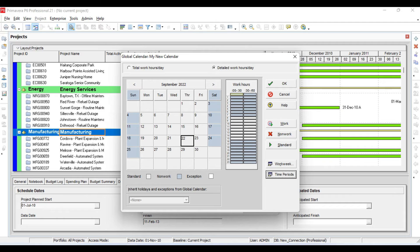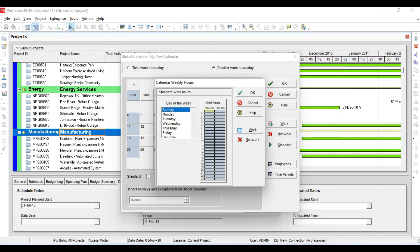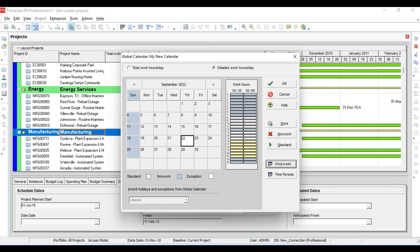For the detailed work hours, I want 12 to 1 PM to be the lunch break. Then I will go to Work Weeks and set Saturday as a working day — I want to make it a working day instead of off.